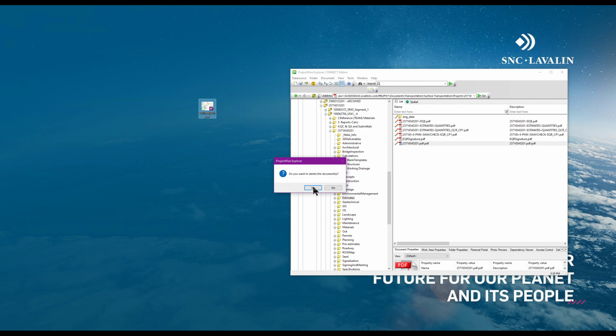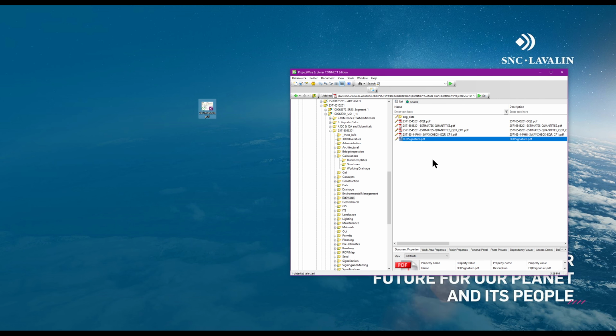And to do the three-way check, what we usually do is we match everything in the Designer Interface website with what's in the estimated quantity report, and with what's in the engineer estimate. So basically those three documents need to match.